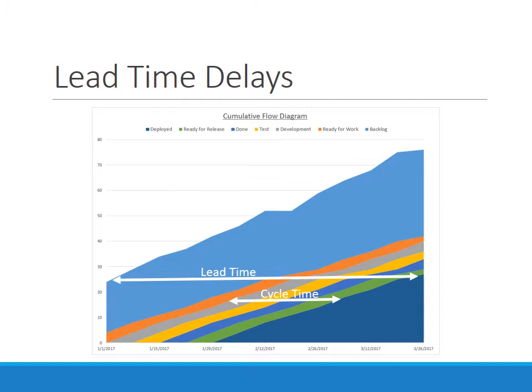This particular graph shows the team is working really well once they get started on work and getting it to production — their cycle time is really good and smooth. The lead time is where the delays are. The backlog is really big, the light blue part, and it continues to grow and get fatter as the graph moves to the right. Work is coming in a lot faster than the team is able to produce. This could be an issue of the team needing to be bigger to keep up with the flow. Lead time being this large means that when somebody has an idea, it may or may not make it to production at all, or if it does, it might take a long time to get there based on priorities.